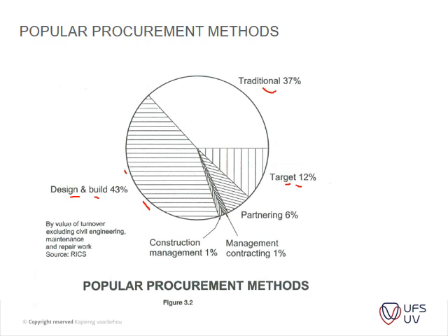Then you've got your partnering, and the one that I spoke about on the first slide basically falls within this category, where you've been working with this one contractor, or with a developer, the design team, and everyone has been working together a little bit already, and you go into a partnership that, okay, we're in this as a team, we will partner together and we will get a certain amount after the project is done.